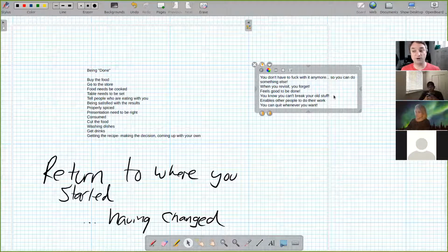If you have a bunch of work in progress, you don't have that option. Every time we make a feature, everything that goes into making that feature done is complete before we do the next feature. And then at some point, we run out of time. I go, I was halfway through this, fuck it. I'll just throw it away. Roll back to my last commit. You've got a complete project.